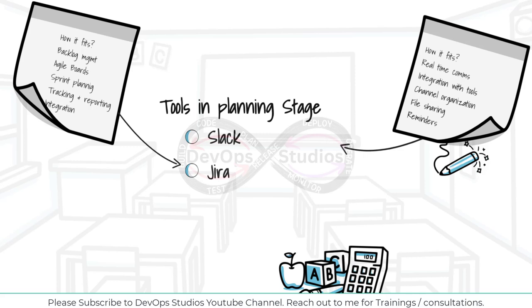We can create and maintain a backlog of user stories, tasks, and epics. Like I told you, we can create user stories, features, and backlogs, and lots of things can be done using Jira, mainly for backlog management. For example, a user story, as a user, I want to reset my password, is added to the backlog and prioritized. This is just an example; there are lots of other examples that help you work on backlog management.